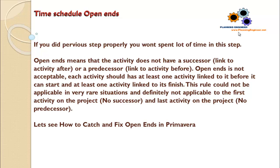This rule could not be applicable in very rare situations and is definitely not applicable to the first activity on the project which has no successor, and the last activity on the project which has no predecessor.